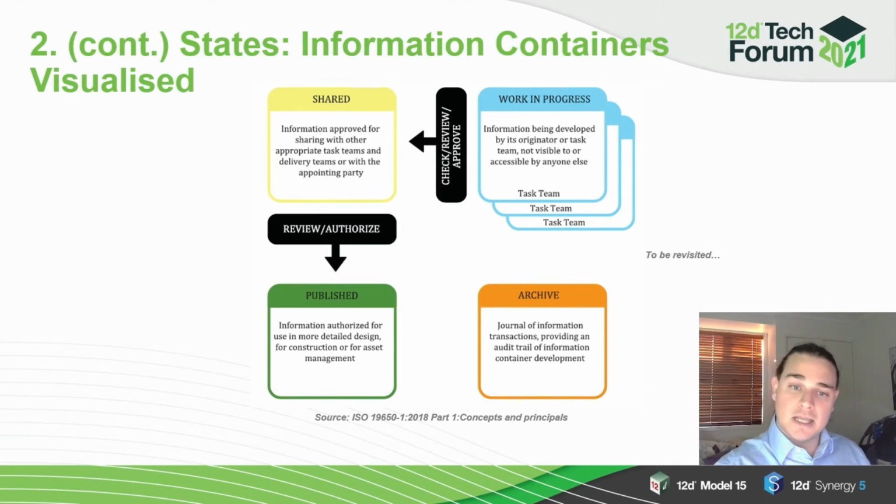And it's in that area of our CDE where we receive comment and review on the information we've been developing and take into consideration the outputs of that review and feed that back in to the development of our document, our model, and so on.